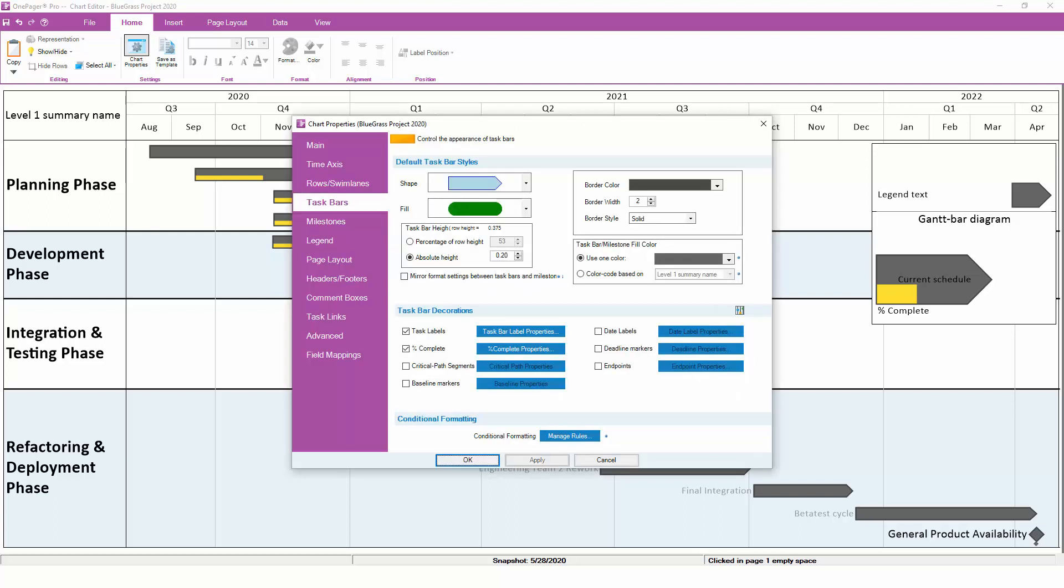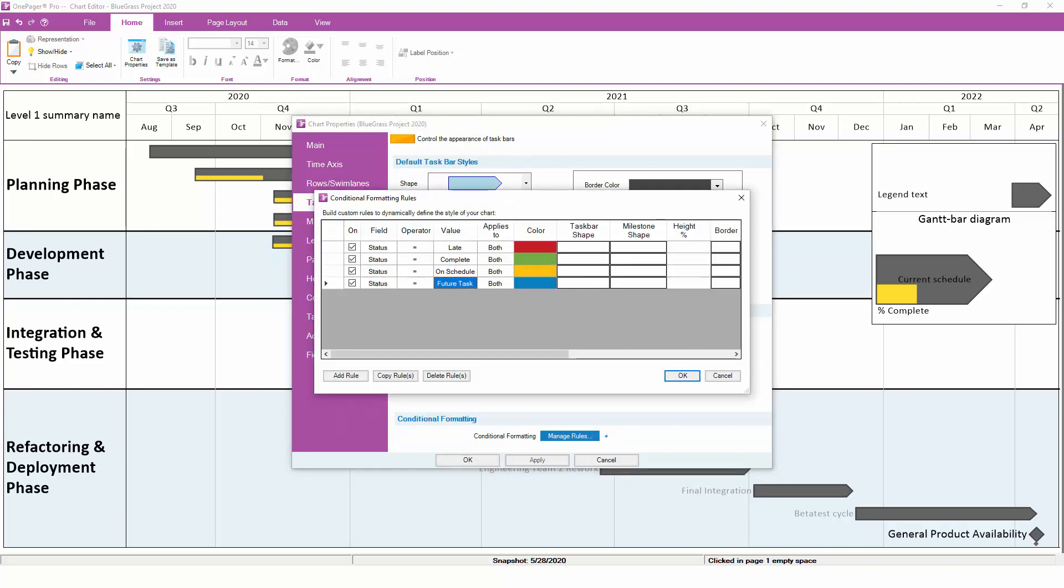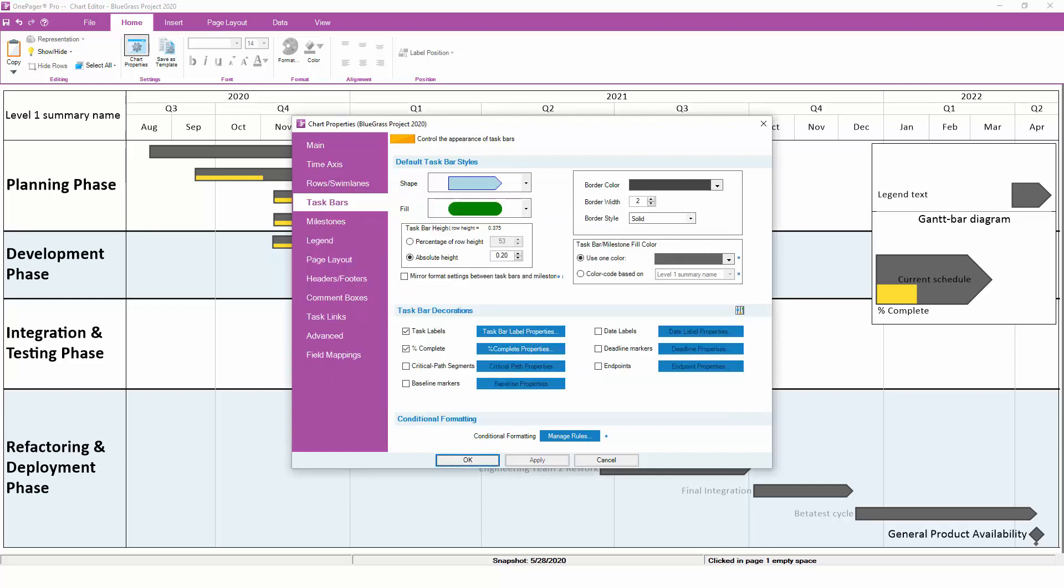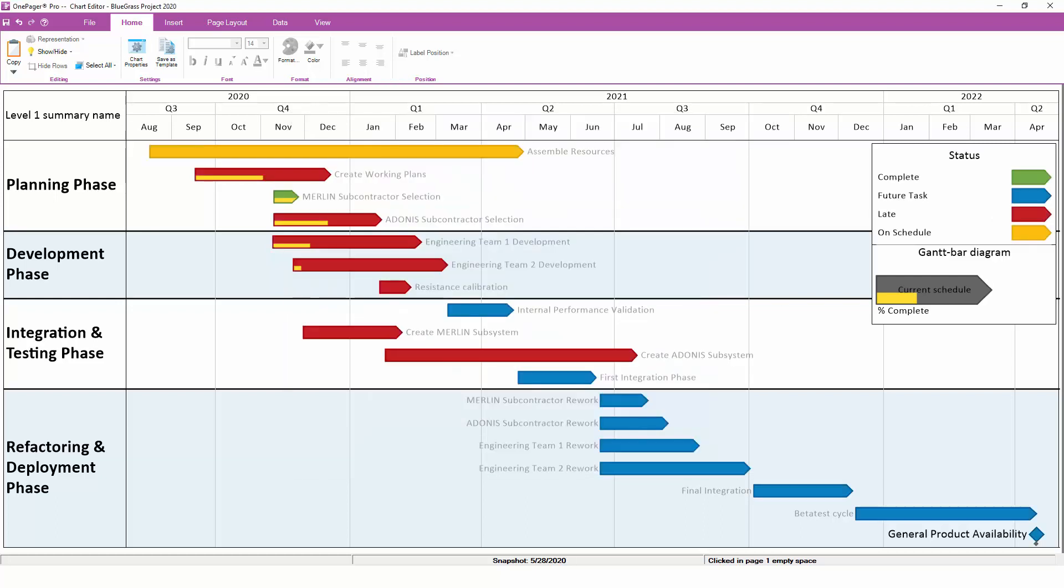The third and most powerful way to assign color is OnePager's patented conditional formatting engine. If you click on the Manage Rules button, you will see that you have the ability to write one or more rules that easily define which colors should be assigned when. Here's an example of conditional formatting rules based on status. When we apply these rules, OnePager will assign colors based on the conditions you've defined.